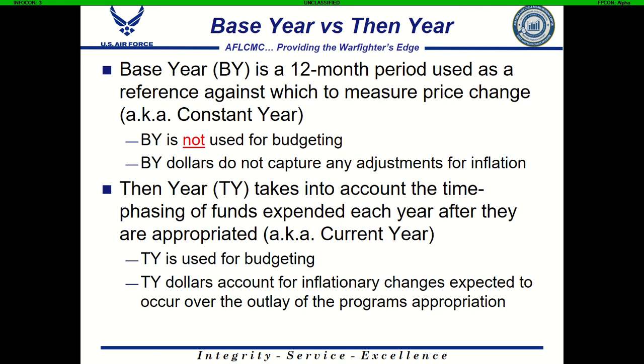actually spend that money: to sign a contract with a contractor for some specific good or service, for that contractor to bill the government for that good or service, and then for us to actually pay that contractor. That whole process, including the contracting process and the whole government acquisition process, takes time, and we often contract for goods or services that take a while to do or to make. So it may take a contractor several years to actually do what we want them to do, but we may have all the money up front to do that work for various reasons.